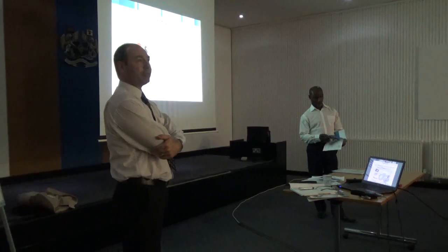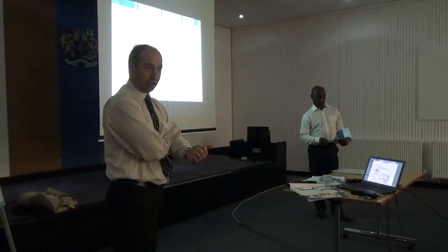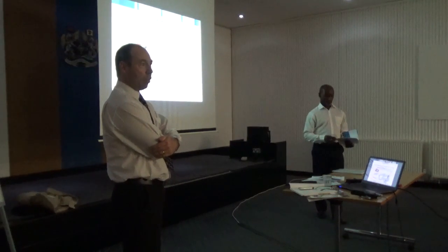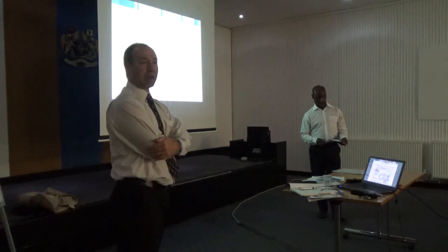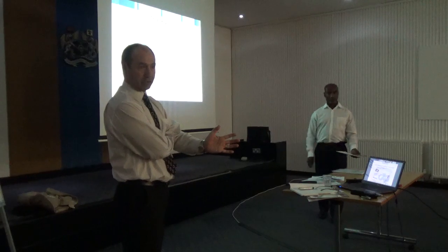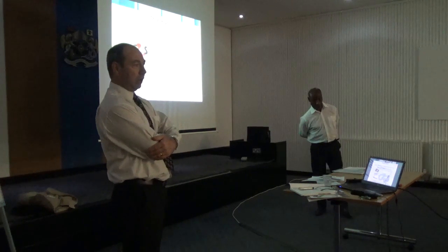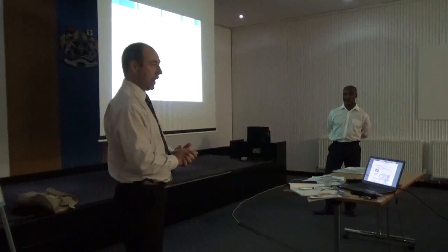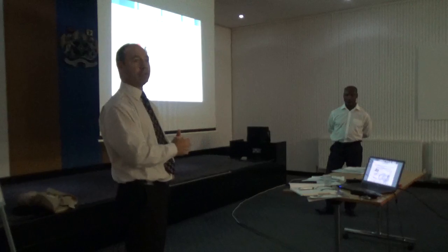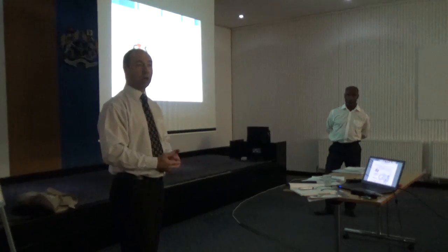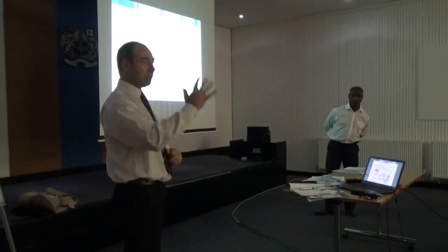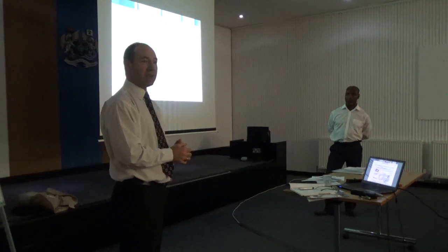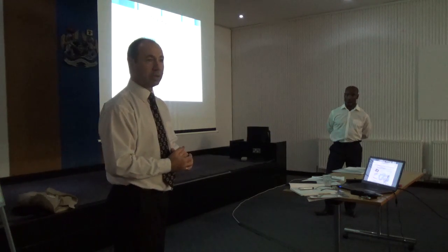The reason that we've focused on that is that commissioning is certainly important. Empirically, I think what the industry has recognised is that more and more buildings are being built with future capacity, or the space for future capacity. So if you take an office block which has only got 5 of its 10 floors let, and there's supposed to be, at the full load condition, say 5 chillers, and there's only 3 in, it's commissioned at a part load state. What we don't do, when that building is now full of people and the additional chillers have been added, is go back and retest and recommission the system. The answer is generally no.